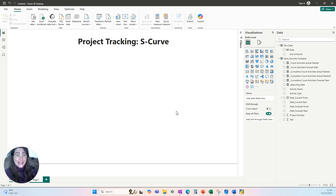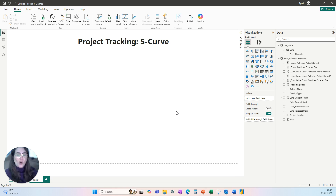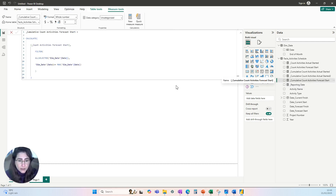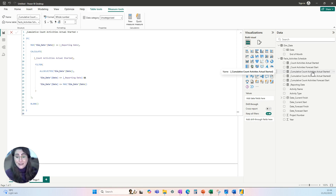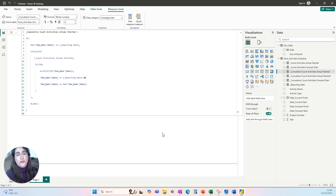Let's look at the DAX measures used. For the S-curve, we need cumulative totals. I have created a measure to calculate the cumulative total for the forecast start — all the activities that are forecast to start — and also the cumulative count of activities that have actually started. The first measure uses the CALCULATE function to modify the evaluation context, focusing on the count of activities based on the forecast date. The second calculates the cumulative sum only up to the reporting date, which is the cutoff date for the specific report.